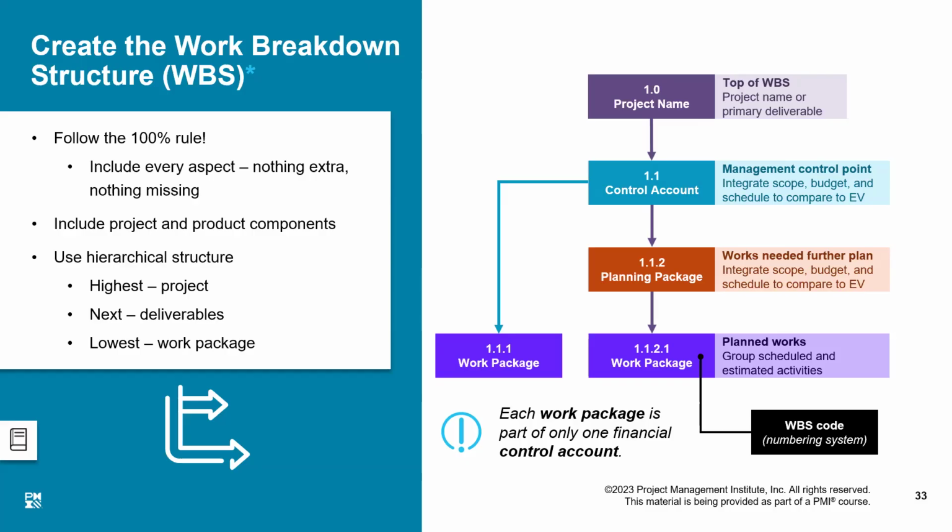But at that time, PMI was using the terminology work breakdown structure, but they are clearly saying that the work breakdown structure need not be broken down according to the work completely, but at least the lowest level should be the work package. If I say that, then product breakdown and work breakdown meet at one place. So the breakdown would be what your project is, what are the major control accounts in it.